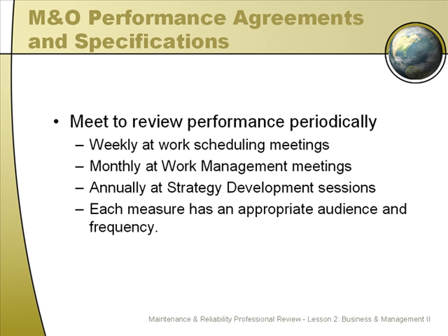At the weekly scheduling meetings, you need to talk about the performance from the week before. This should be something that you just routinely do. It should only take a minute at the beginning or end of the meeting. Just get in the habit of doing that. Make someone responsible for it. If you need to rotate it, that's fine. But the measures are going to be coming in through a process we built earlier that's consistent and put together by people that are responsible for it, and it should be in a timely fashion so you always have it.